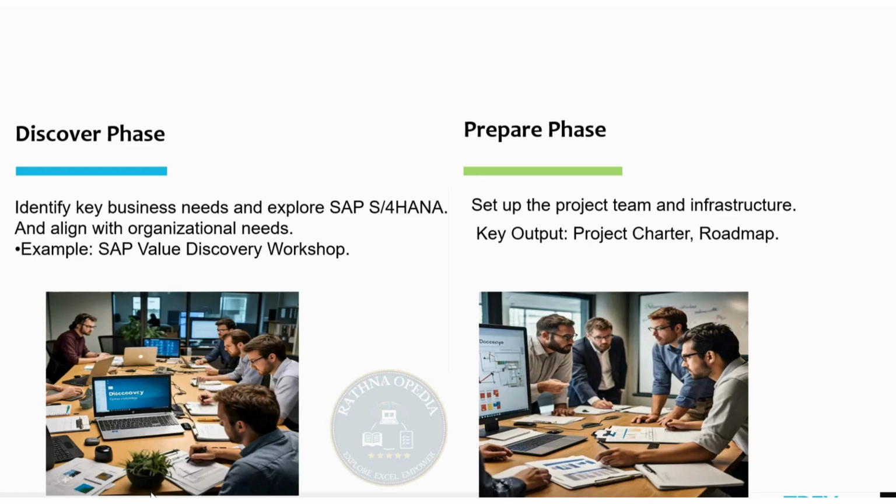In this phase, we establish a team and assign the tasks. A project kickoff meeting is conducted to ensure all the members understand their roles and responsibilities. Additionally, the development, testing, and production environments are set up. To do a project, we need all three environments, development, testing, and production. We need everything, so we set up all the required environments.